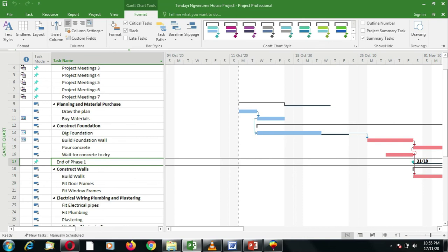You can then set that average slack per task as the threshold for critical items, meaning that if the item delays for longer than its average slack, it starts to eat into the slack of the other items. In that case, your slack threshold is no longer 0, because you can afford to have slack because of the long duration that you have.